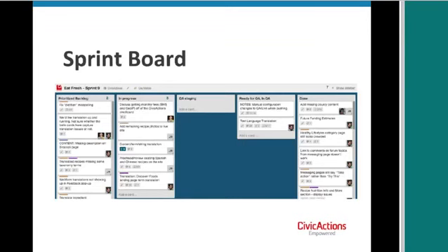So that grooming would happen before the item enters the sprint, and then you'd have enough information to provide a reasonably realistic estimate from that. That's right. And the goal of the product backlog grooming meeting is to make sure that you have enough stories or enough items for the next sprint. The rhythm you want with your team is, a lot of people start on a Monday and then end on a Friday 2 weeks later.